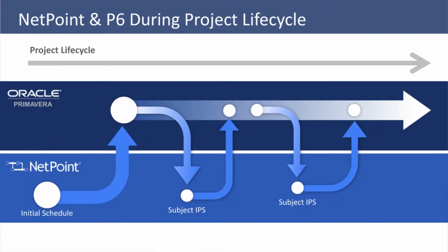What's the next step? So we'll hold these subject IPS sessions talking about, all right, let's detail out the Building 2 design, or the early packages for Building 2, or a suite build-out, or whatever it is. Sometimes those IPS sessions would turn into a detailed work plan, and they would never make it into P6 because we don't need that level of detail there, right? Here you go, Joe, project manager. Here's your work for the next 3 weeks. You guys work on that. But more often than not, it's schedule that we did want back in P6.